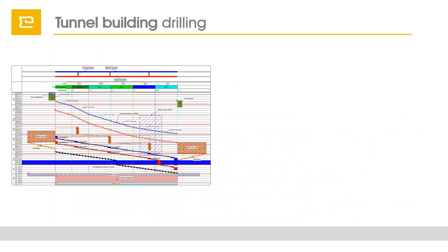It is the Brenner Tunnel, and there we take all the data from big Excel tables up to 50,000 lines and compile, based on macros, activities representing the drilling of the tunnel and also the finishing work. And in this project, TILOS is the only planning system that is used at the moment.